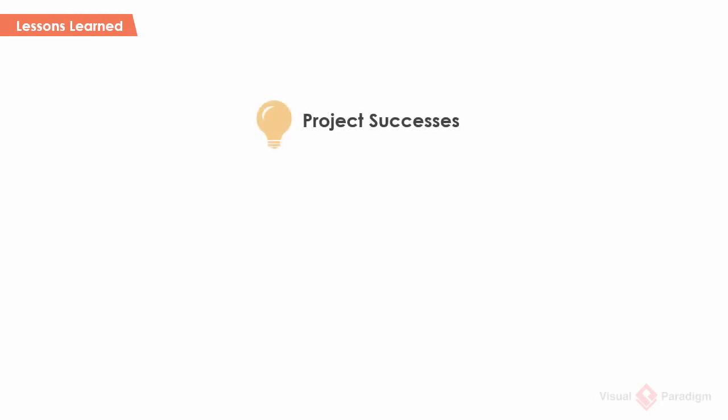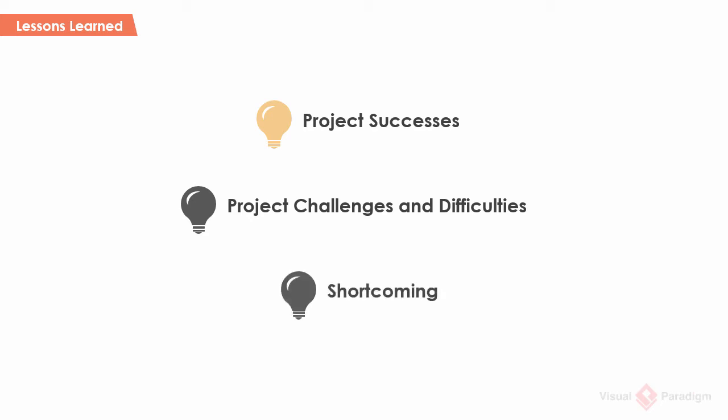A typical lessons learned document consists of three parts: project successes, which are the key successes of the project; project challenges and difficulties, which are the difficulties faced during the project lifecycle; and shortcomings, which are the tasks and decisions performed and made wrongly. Let's take a look at some examples for each of them.